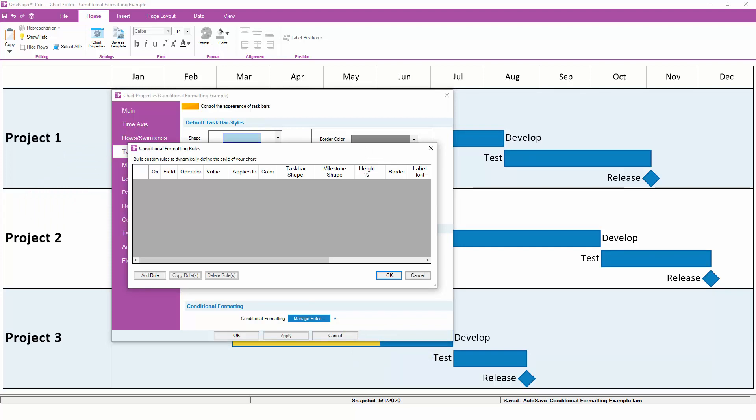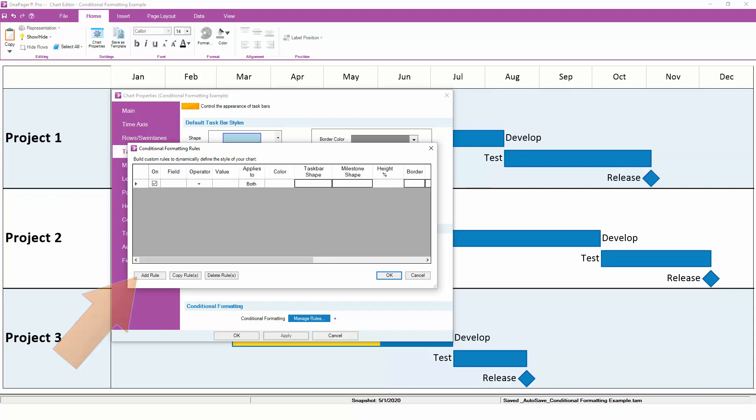In this example, let's plan to color code by status, where late tasks are red and completed tasks are green. Click on Add Rule to create your first rule. We want One Pager to look at the Status field, so we'll pick that from the dropdown.